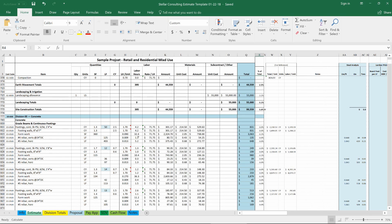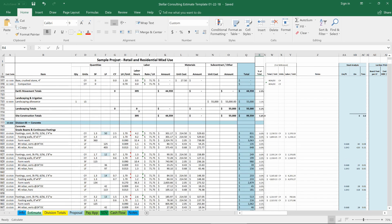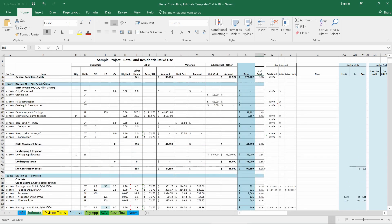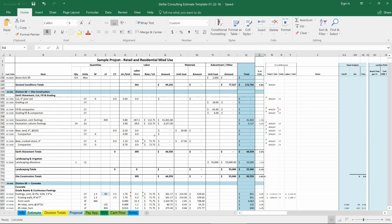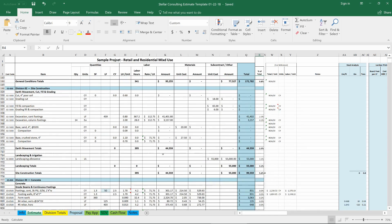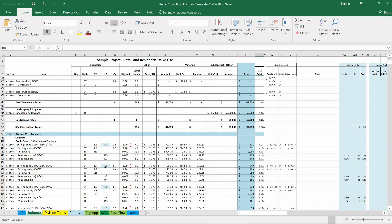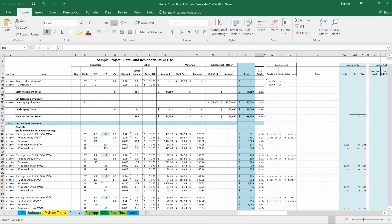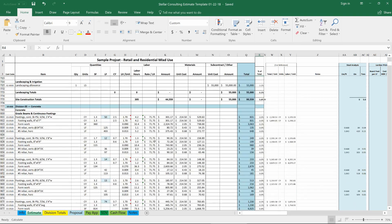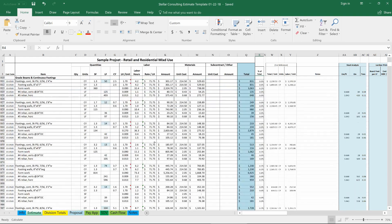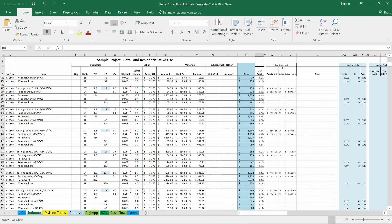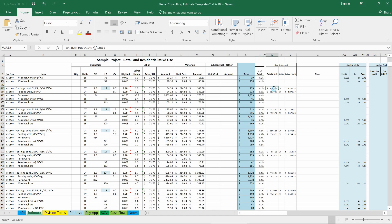Once that information is plugged in, coming in and filling all the information in through the spreadsheet, picking up off of those line items in the info tab where applicable, and everything calculates out, including percentages of the total. We've got cost code columns, we've got some reference numbers so we can see what the total is per that unit or the total just for the labor only for that item.